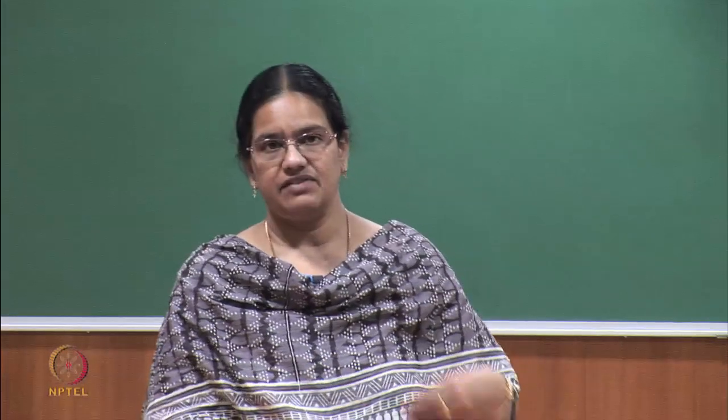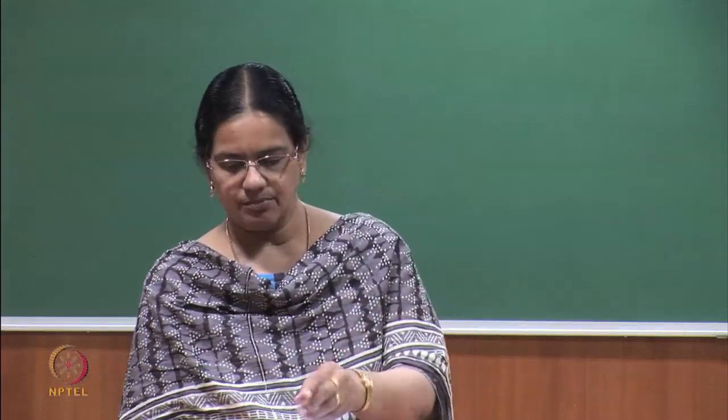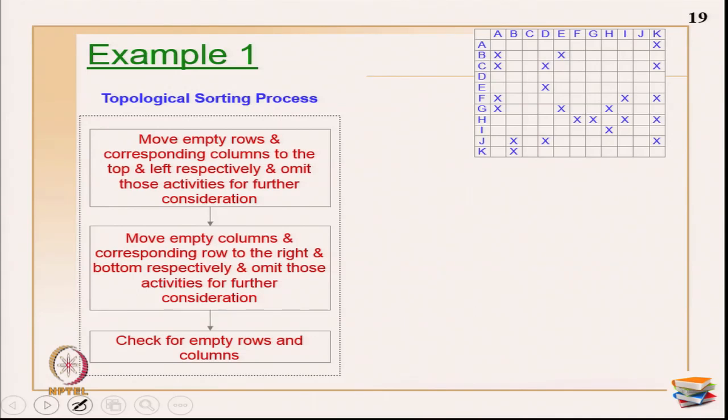Already you know what is the best sequence to operate the entire flow, okay. That will be very sure: if you do not have any x marks above the diagonal, then directly you can go to the last step, saying the matrix has already been partitioned, okay. Now, since I have x marks, the same example I have shown you in a smaller form on the top, so that you will follow the slides.